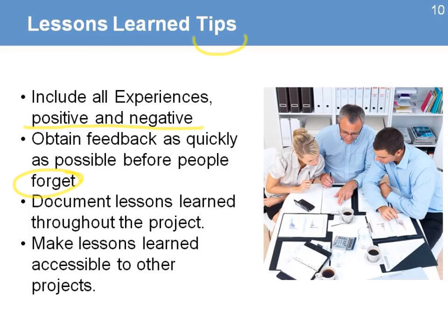Document the lessons learned throughout the project. Don't just wait until the end of the project to have this session. It's good practice to have it at midterm during the life of the project, or at specific milestones where you can have a special session, because they will help you while you're managing the project. Lessons learned at the end of the project would only help future projects, but you can have smaller lessons learned sessions during the life of the project, and you capture those lessons, those improvements, those recommendations in your current project.